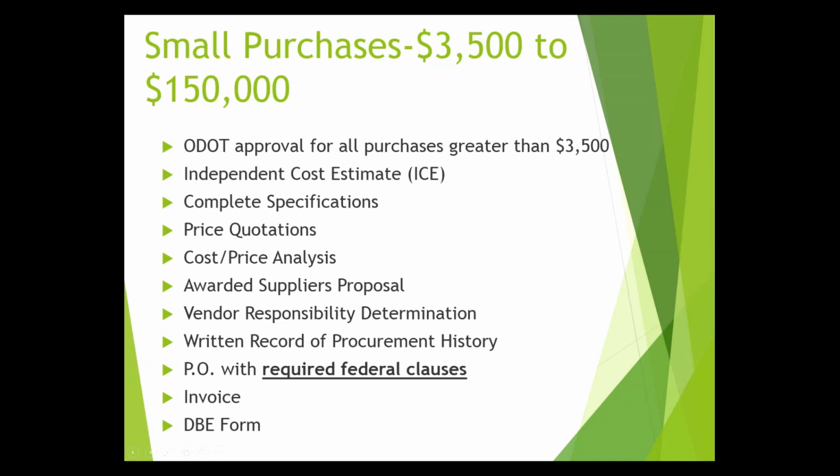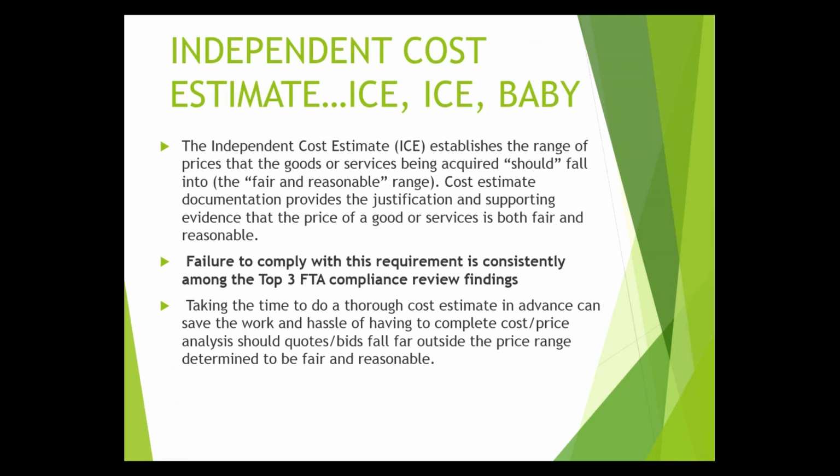Independent cost estimate, that's my favorite. ICE baby, we just call it the ICE. So this establishes the range of prices that the goods or services being acquired should fall into. This is the fair and reasonable range, what you would expect to pay given what you're purchasing. Cost estimate documentation provides the justification and supporting evidence that the price of a good or service is both fair and reasonable.